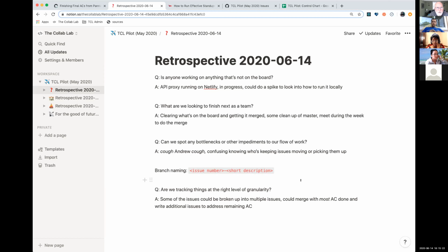I could see taking the issues as I've written them and literally trying to make it 1 issue per AC wherever possible. Then it'll be clear that you can't really do this AC without this AC, so you group them into stories, but only because you have to. Otherwise, they're really small pieces of work. Kind of against what you were talking about last week. Yeah, kind of. As a pair, you might take something and finish it right in the session, and then take the next one. Maybe get 2 or 3 things done in your week, and you have multiple issues flowing through the board.